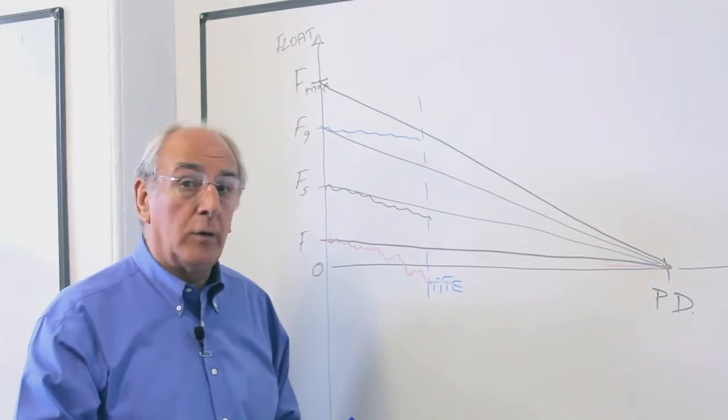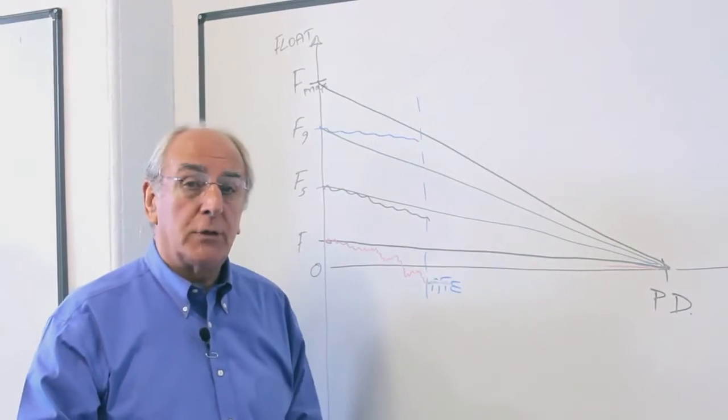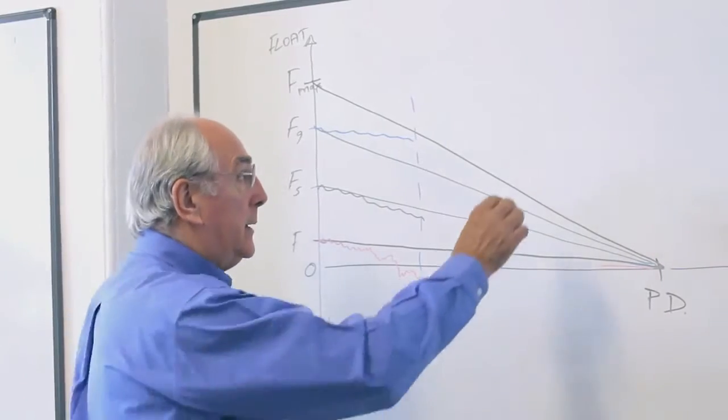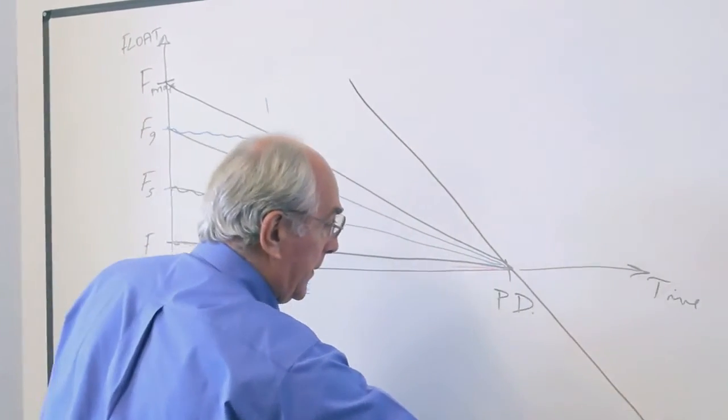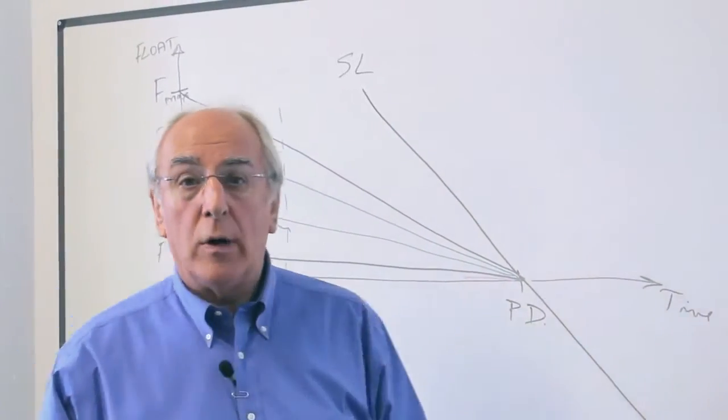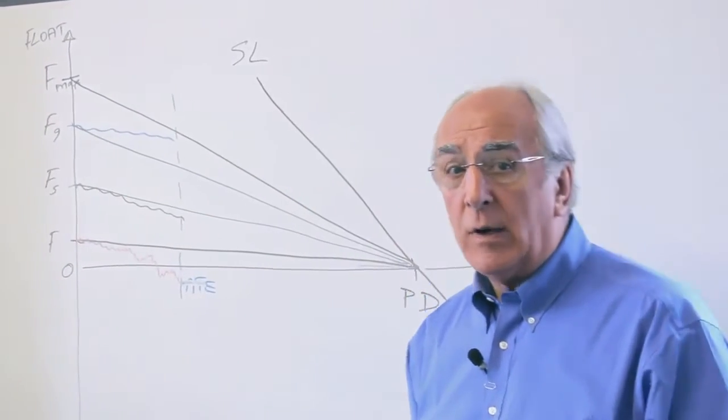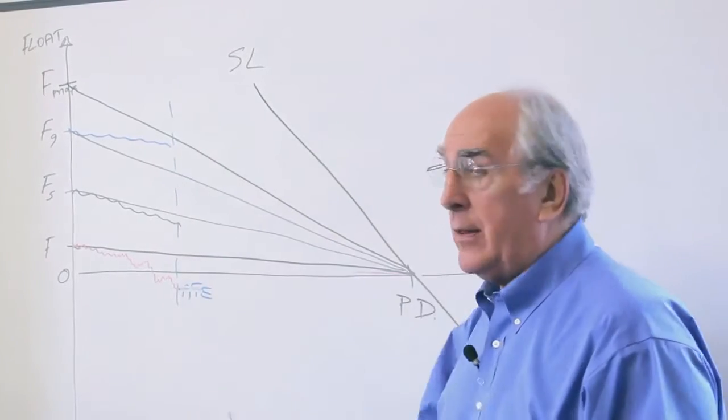Kilpatrick envisaged a line that he called the sensitivity line, and he drew the line through the project duration point. Let's just draw this line through there like that, so we'll put an SL up there for the sensitivity line. Now what is that sensitivity line? Well, it's a mechanism for translating lateness as shown by the loss of float into lateness on the project duration.